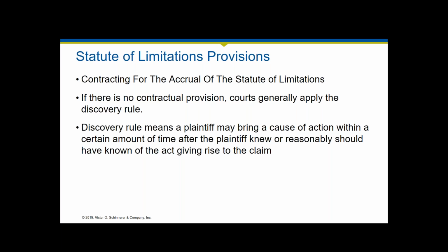In the absence of an agreement between you and your client, courts generally apply the discovery rule, meaning a plaintiff may bring a cause of action within a certain amount of time after the plaintiff knew or reasonably should have known of the act giving rise to the cause of action. Now, you have to realize that the statute of limitations can have a significant impact on litigation between a design professional and owner. Something as simple as a slip and fall provides a date known: you slipped and fell on that particular date, so it's fairly easy to decide when the statute of limitations starts ticking.